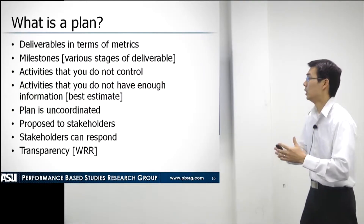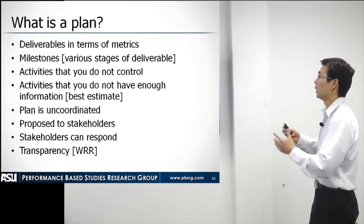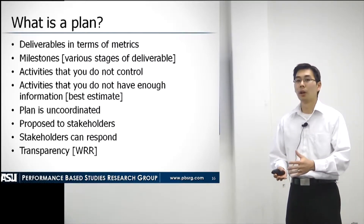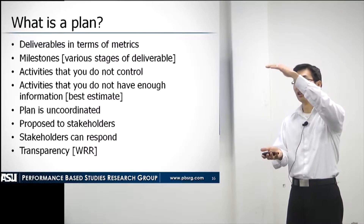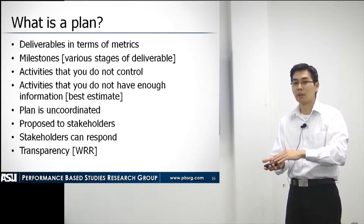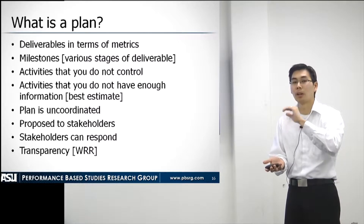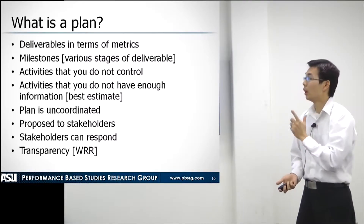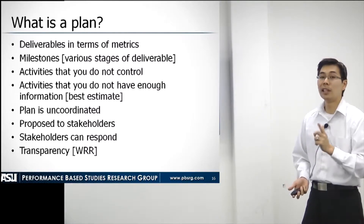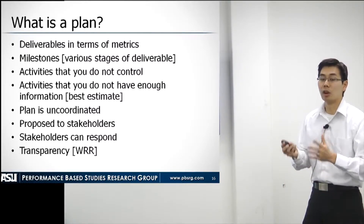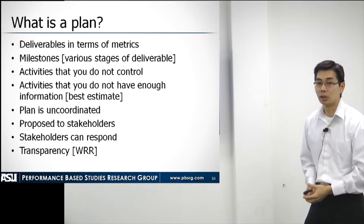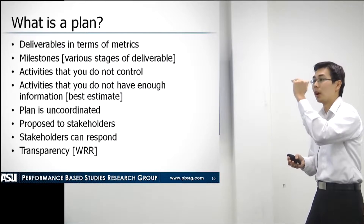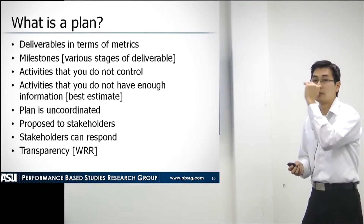What does it mean to deliver a plan? We will want the deliverables in terms of metrics. Unlike a traditional project where the contract will be based on a list of actions and technical items that the vendor will have to check mark and say they delivered, in the best value system the identification of whether they delivered the contract and the scope of work will be based off of metrics. Hence we don't care exactly if they check marked every line item or every action item.